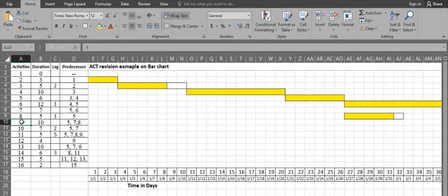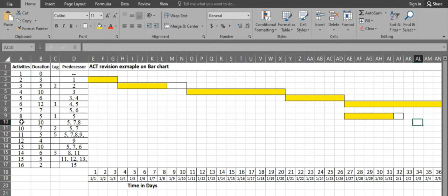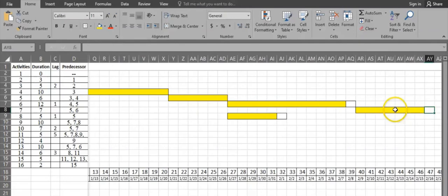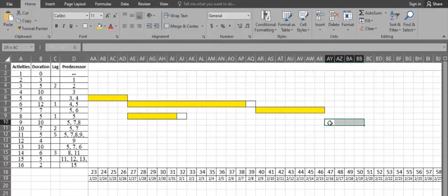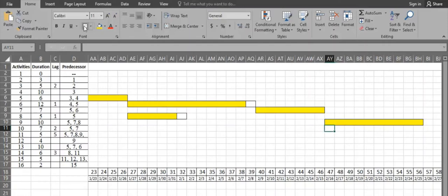Activity 9 has three predecessors: activities 5, 7, and 8. Activity 5 finishes on day 26, activity 8 finishes on day 32, and activity 7 finishes on day 46 — the latest. So activity 9 starts from day 47 and has a duration of 10 days: 1, 2, 3, 4, 5, 6, 7, 8, 9, 10 — finishing on day 56.